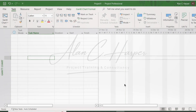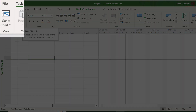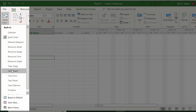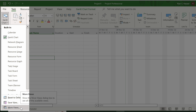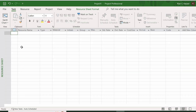Here I am in Microsoft Project, and if I wanted to switch to my resource sheet I would normally go up to my task tab, go to the view group, then drop down the Gantt chart option. When I drop that down I can see the list of options to choose from, and if they're not there by default I might have to come down to more views — but as it is, the resource sheet is here for me.